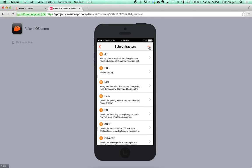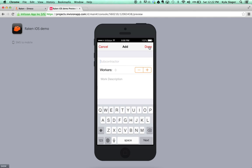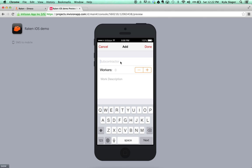To add a contractor, you can hit the plus button, enter contractor name, number of workers, as well as the description of work. You can either type or dictate these entries using Siri. The contractor name will carry over each day until removed, while the number of workers will reset to zero and the description of work will reset to blank each day.